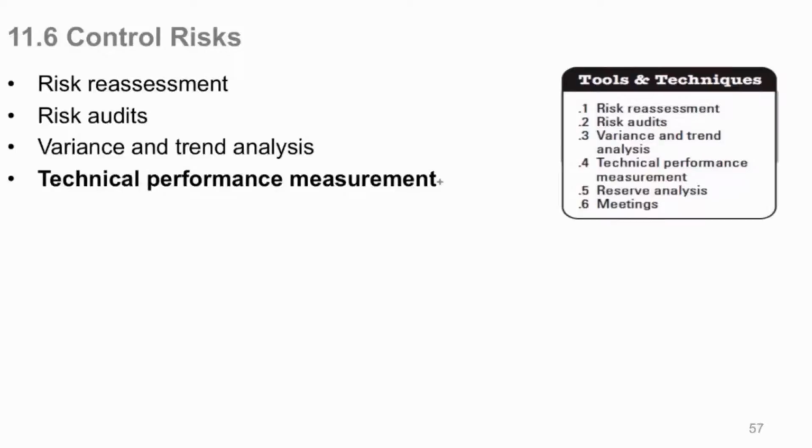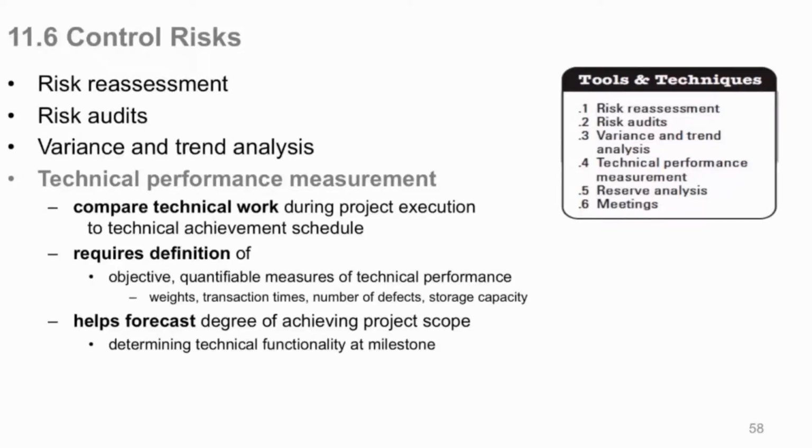Technical performance measurement. Compare the technical work during project execution to the technical achievement schedule. Now, here's your technical work, here's your achievement schedule. Are you making it? Technical performance, if you're not making it, there's risks there. Risk can come from anywhere, so don't overlook anything.